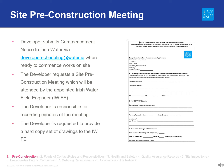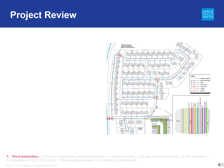The developer is asked to provide the field engineer with a hard copy of the drawings detailing the proposed water service works. During the site pre-construction meeting, the field engineer will review the specifics of the project with the developer and key personnel. The developer is required to outline the sequence of the construction programme and any phasing requirements, and should provide a planned connection date. This is important so that Irish Water's delivery partner can apply to the Roads Authority for a road opening licence if required, a process that can take a number of weeks. If a temporary connection is required, the developer should have submitted a temporary connection application to Irish Water.